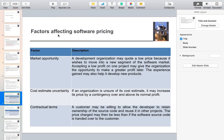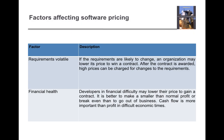The fourth factor is requirements volatility. If requirements are likely to change, an organization may lower its initial price to win the contract. After the contract is awarded, high prices can be charged for changes to the requirements. Since requirements keep changing, a company can start with a low price and keep increasing it as requirements evolve.